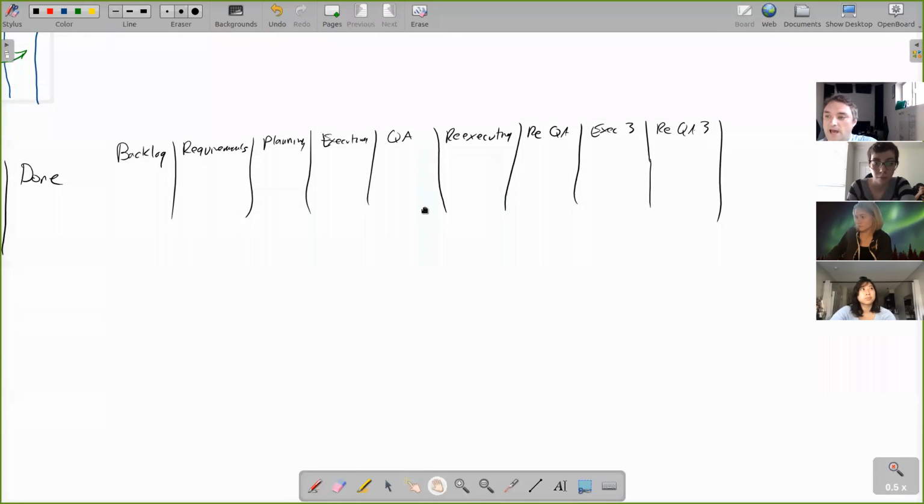So what inevitably happens when you're using this Kanban board and you've visualized your work is, all right, our constraint is probably somewhere in this QA, re-QA, redo. That's probably what's stopping the flow in our system. So you identify a constraint. First step is to exploit the constraint. Can we re-engineer this to be more effective?